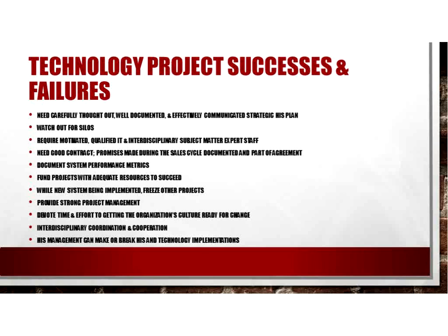What are your upgrade path expectations? We need to address certain key upgrades and enhancements that have been presented in that sales cycle, and it should be outlined and committed to in the contract with the vendor. Cooperation with other vendors is important. That new system vendor will have to work and cooperate with other vendors to construct those interfaces for the different systems, because they're going to be sharing data. So your vendor must be able to work collaboratively with other vendors.